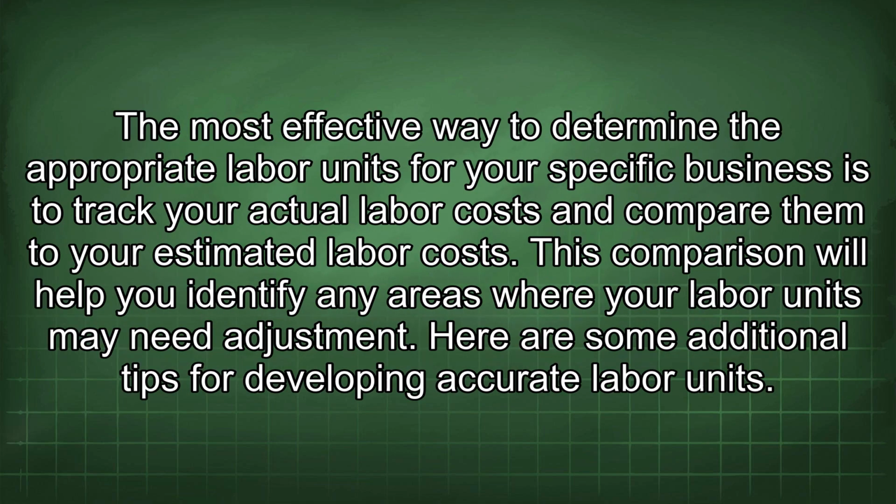The most effective way to determine the appropriate labor units for your specific business is to track your actual labor costs and compare them to your estimated labor costs. This comparison will help you identify any areas where your labor units may need adjustment.